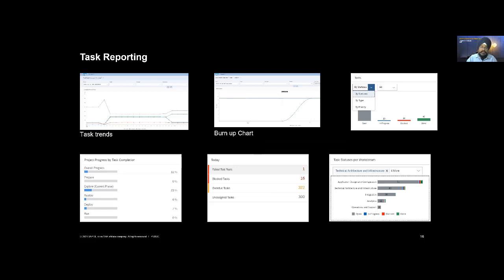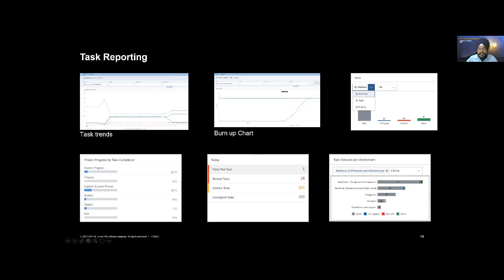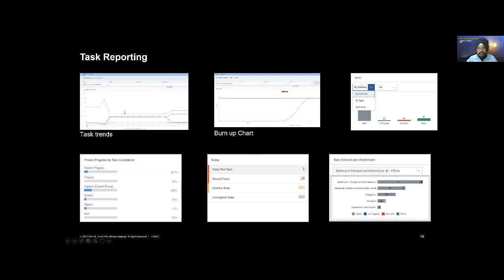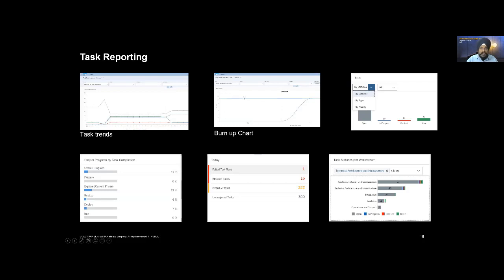The parent-child relationship is very simple and it's a formal hierarchy, such as deliverable is the parent of a task. Task is the parent of a subtask. Predecessor-successor relationship is where the system recommends - a soft recommendation that we urge you do task A before task B. But if you have valid business reasons and want to do B even when A is not complete, we don't stop you. This is the same principle of flexibility I explained before. What are the different reports we have built on task management? Since task management is the pillar at which the project stands on, you really have to track these tasks to identify risks, make sure you're adequately staffed, and you really need good reporting.